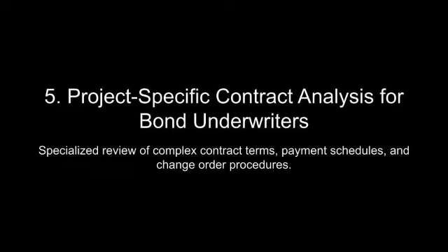The overlap between indemnity clauses and insurance coverage is another critical area of analysis. Many contracts require contractors to obtain liability insurance policies, such as commercial general liability (CGL) coverage, to complement indemnity provisions. These policies typically provide a financial backstop for indemnity obligations, covering losses arising from property damage, bodily injury, or other specified risks. However, conflicts can arise when indemnity clauses and insurance terms are misaligned.